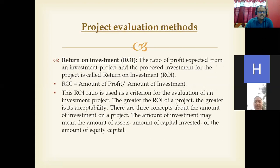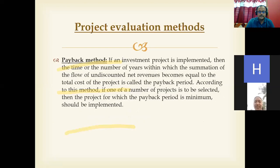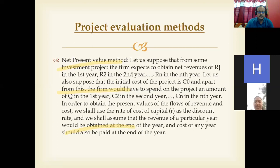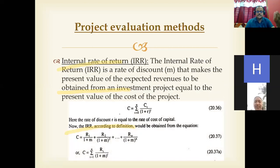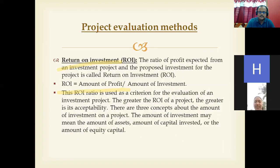There are certain evaluation methods. In financial terms, these include return on investment, return on assets, return on capital employed, return on shareholders' fund, payback period, net present value, and internal rate of return. Return on investment: if you've invested 10 lakhs and are getting back 11 lakhs, your profit is 1 lakh, so ROI is 1 lakh divided by 10 lakhs. The greater the ROI on a project, the greater will be its acceptability.